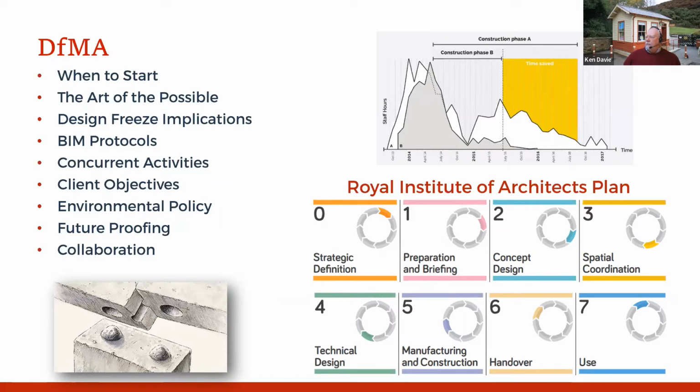The one thing about OSM is if you're actually manufacturing in a factory or factory conditions, you can then do your inspections, you can do your quality control checks off-site before things are actually then delivered to site. And that has a major impact in terms of resource requirements. So from a designer's perspective, you potentially can move on to the next project far quicker if you have a limited amount of resource. With the resource tailing off far more quickly on an OSM project, you can then move on to the next project more quickly.